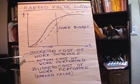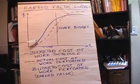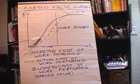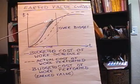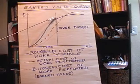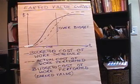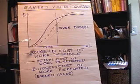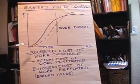The first curve you can plan right away is the Budgeted Cost of Work Scheduled — that's this blue line here. That's the actual budget. We can plot that line at the very beginning of the project. You can see that most projects start off slow, then you have a lot of resources going out in the plan because you've got a lot of activities going on, and at the end of the project it levels out. In Microsoft Project, assuming you've got the cost inserted associated with each activity, you can plot that budget curve.